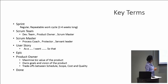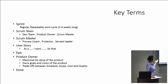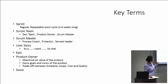And then we have user story. A user story is something very similar to our requirement. Traditionally, we used to write use cases with alternative flows and happy case scenarios. Now, the user story has a specific format — for example, 'As a customer, I want to cancel the ticket so that I can make alternate plans.' This format forces the product owner to think why we are building something, and it makes the developer think about what needs to be tested.